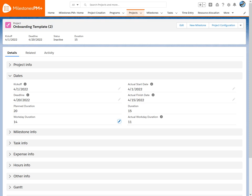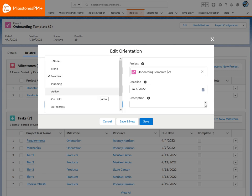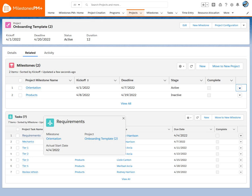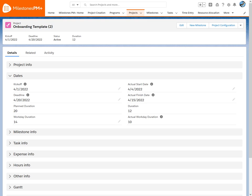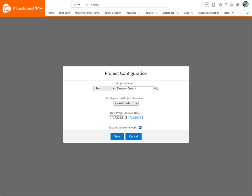All without impacting the actuals, so all necessary data is preserved. These dates can be updated by Milestone and Task. Marking a Milestone as active changes the project status and updates the actual start date of its first task. The correlation between the different project levels and related fields can be synced or separate depending on your preference. Date shifting is easy with our project configuration — set a different kickoff or deadline while maintaining duration and cascading across the whole project.